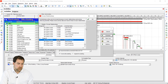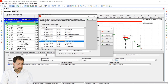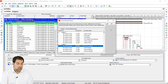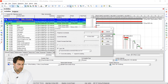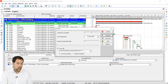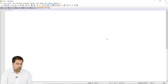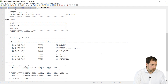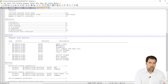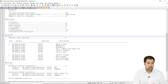Looking at this pop-up, the solution seems easy, but sometimes these lists can be really long. Also, this pop-up doesn't allow me to do any editing, so it's not very handy. I'm going to show you other tools I use to solve these loops, because as soon as I click OK the list of activities is gone. So let's click OK, then hit schedule one more time — this time we'll click 'view log.' I highly recommend you always run a schedule log. Make sure 'log to file' is on and sent to a text file. The notepad opens and if I scroll to the error section I can see the same list of activities — the two loops in my schedule. We want that list in the schedule log, not just the pop-up, so I can reference them in my schedule.